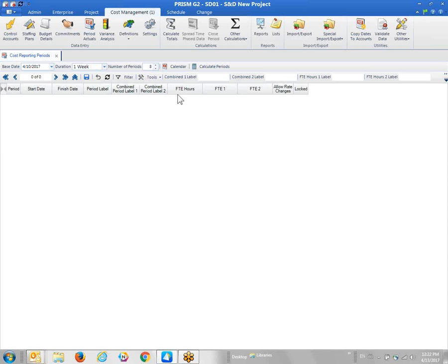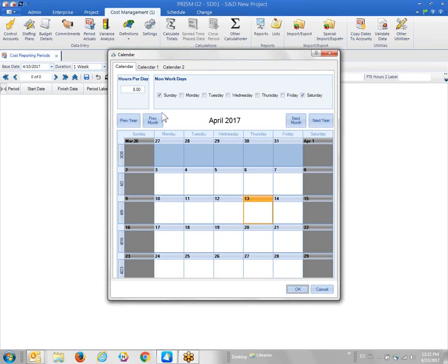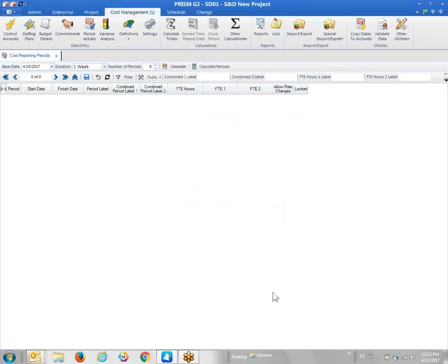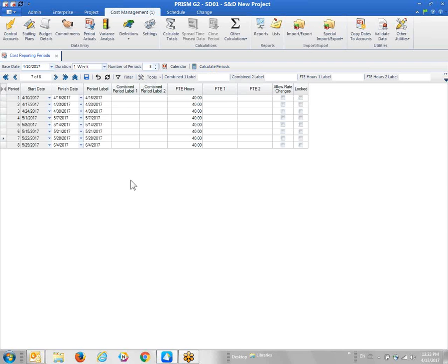It's 2 months, 8 weeks of this project. In terms of working hours, there's 8 hours a day. We don't work weekends. We can also indicate the holidays. And with that information, say, okay, set up my reporting periods. And I just want to make sure I want to report every Friday. So let's make that first period from the 10th to the 14th. Therefore, I'm always reporting on the Fridays.